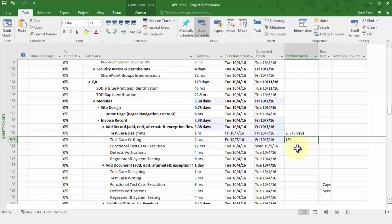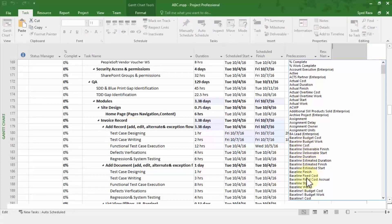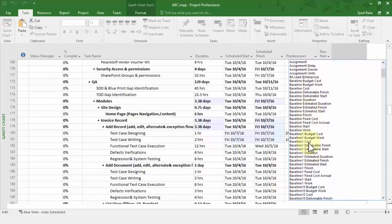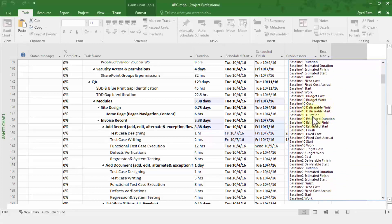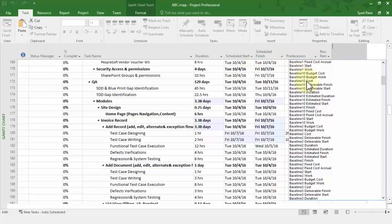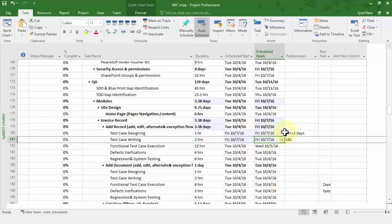We also talked about baseline dates. You can add a Baseline Dates column where you set dates that won't change — so even though project dates shift, the baseline dates remain constant. There are many powerful column options available, including estimates, finish dates, and others, all of which can be added as new columns in the project. I wanted to give you this high-level overview. As homework, play with it and work with it. Feel free to ask questions, and let's move to the next lesson.